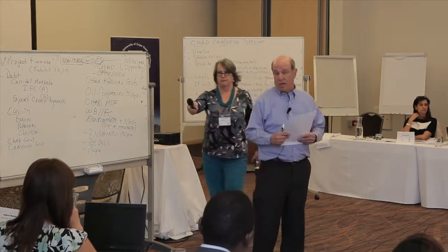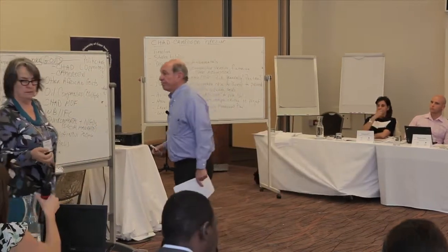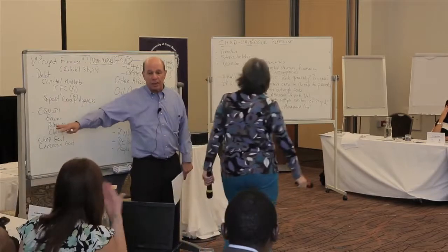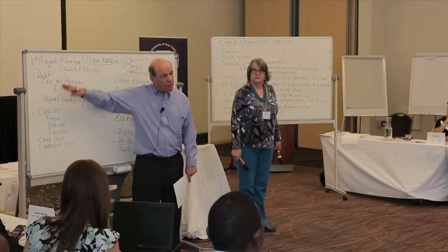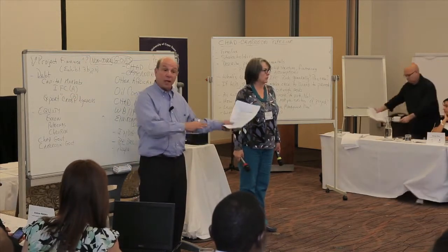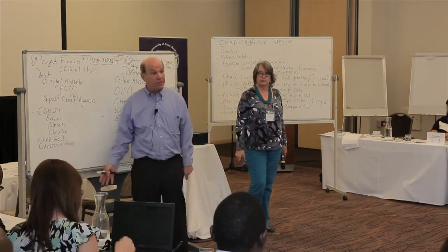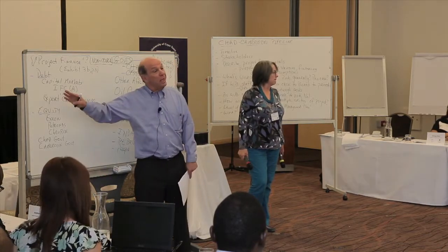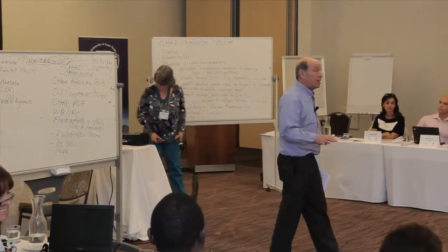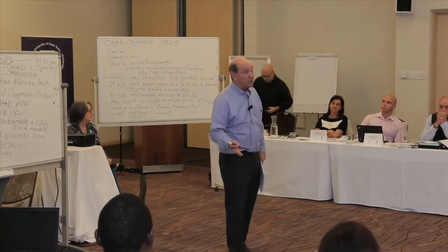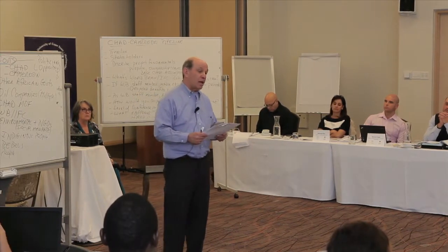Why does anyone ever create a consortium? Risk mitigation. Period. It's to spread the risk. That's why you have a syndicate of banks to lend. It's to spread the risk across more players. It becomes, on the one hand, more complicated because you've got to get along with these people, and you have to have agreements on how you're going to split the profits and so forth. But in a country like Chad, we don't want to be too critical of our friends in Chad. But in a country like Chad, where we've already established it's more or less high risk, we want to spread the risk, and that would be one of the reasons why there would be a consortium.